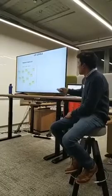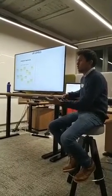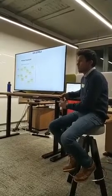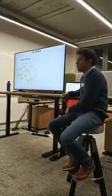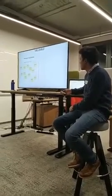So this is how it looks when you have UX levels in your product backlog. Your PO can take a look at the UX level, sit with the designer and assess, hey, what level this user epics and user story can belong. Then you can assess all these stuffs, and then you can plan your sprints accordingly.